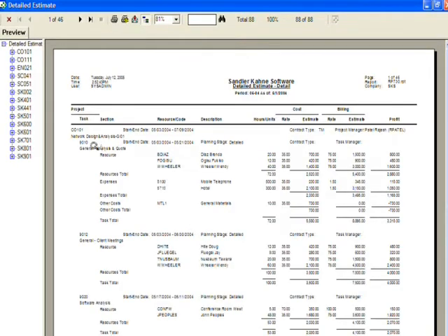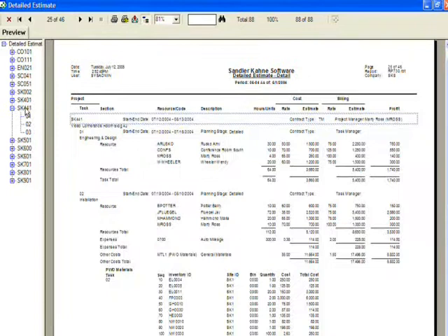And this goes out, and it takes all that data that we've been putting together in the estimate and puts it into a nice little internal report for us. I'll go out here, there's SK441, and now here we see SK441, task 1, task 2. Here let's look at task 2, where we had our resources identified with the hours needed, their cost rates and extensions, their billing rates and extensions, and then the profitability on a line item basis. Then we get down, here's our auto mileage that we specified, remember, on that expense tab. Now here's our materials, and notice we have the summary line here showing us the 11,664 and etc.